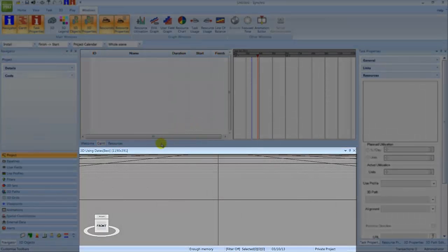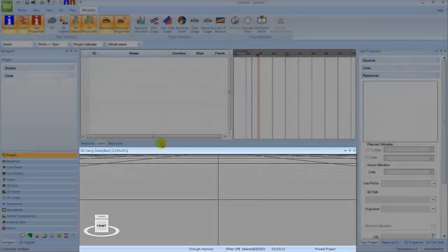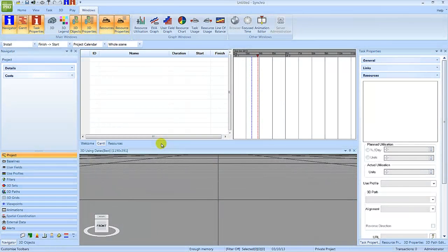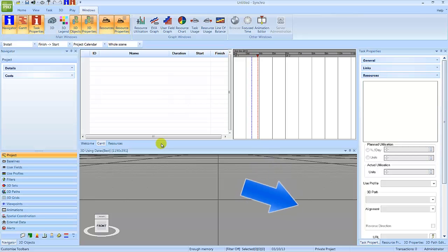The 3D view displays the modeled resources at any defined point in time. The date for which the model is displayed is controlled by the red focus time bar in the Gantt chart and is also indicated by the date in the status bar at the bottom.